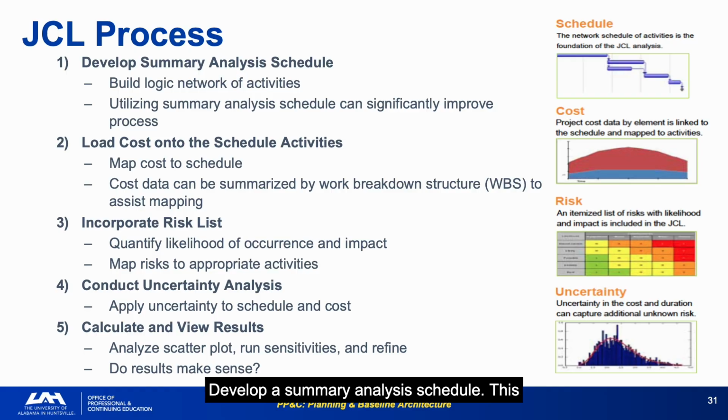Develop a summary analysis schedule. This is often misunderstood. You do not run the JCL on a 10,000-line IMS. You build a summary schedule of the key drivers, hundreds of activities, not thousands, that captures the critical path structure.